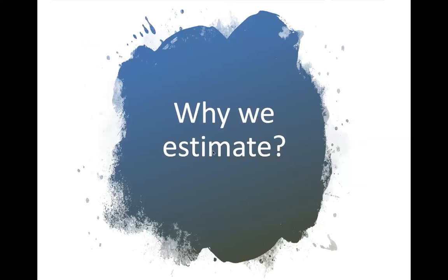Yeah, I think we can also go based on complexity, like a three-pointer story. Now we are comparing it with a new story for how much more complex it is than the prior one. Yeah, exactly. So the complexity we are considering. Again, the baseline user story we identified, this user story we spent 3 units on in the past. So again, the complexity comes in when we are providing extra time, or we are thinking we need to do some more work on that. Then the complexity is coming in here.